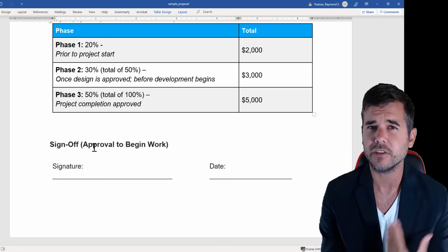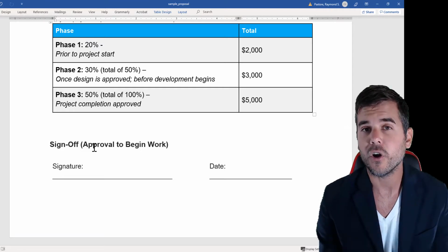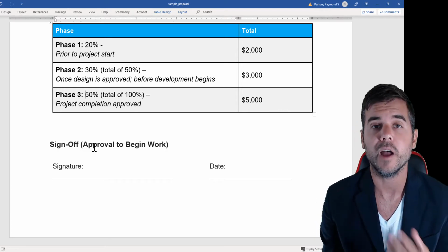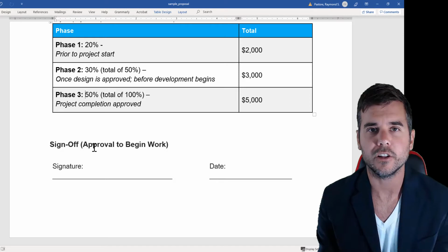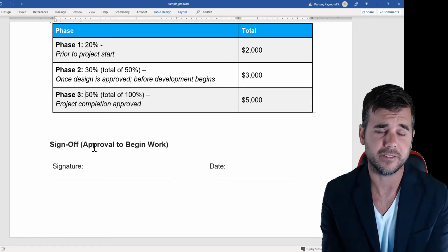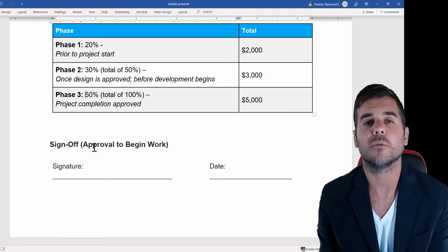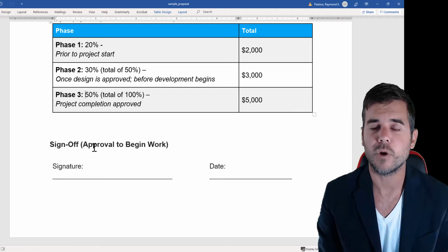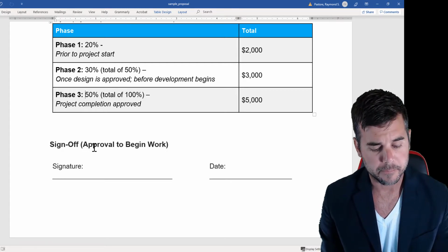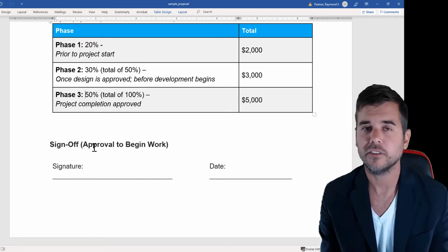First of all, especially as you start to talk through government proposals and projects, they have their own set of requirements. They will say in their proposal, hey, we want you to include this in your proposal. We want you to include this. So you have to include all that stuff. Like they may want full resumes of all employees, of everyone working on the project. They may require a full 1 or 2 page resume versus the paragraph that I have.